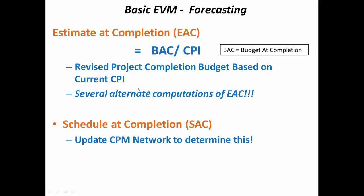This is one basic way of computing it. Most people recommend that for schedule at completion, go back to the network, update it, and estimate schedule at completion based on the network. Although earned value terminology gives an equivalent equation for schedule at completion, it is recommended to go back to the CPM network and update it to find schedule at completion.